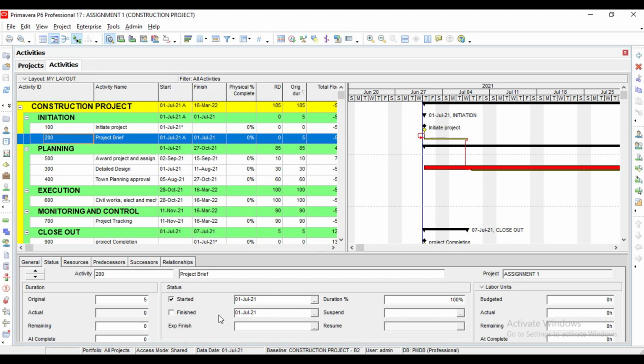You can see that by virtue of the fact that I have finished this activity in one day, the program has looked at my project, everything together, and I was able to achieve this activity. What I was supposed to do for 5 days, I was able to do within a day, and it has reduced the duration of my project, and the project is now 16 days.